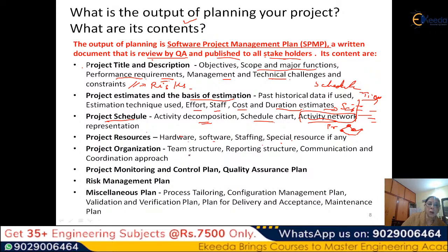And project organization, we have to do the team structuring and report structuring. That also will be part of our SPMP. The project monitoring control plan, quality assurance plan, risk management plan, and many miscellaneous plans. Miscellaneous plans could be how we have tailored the process, what process we will follow, the configuration management plan, testing, verification, validation, plan for delivery and acceptance, and the maintenance plan.